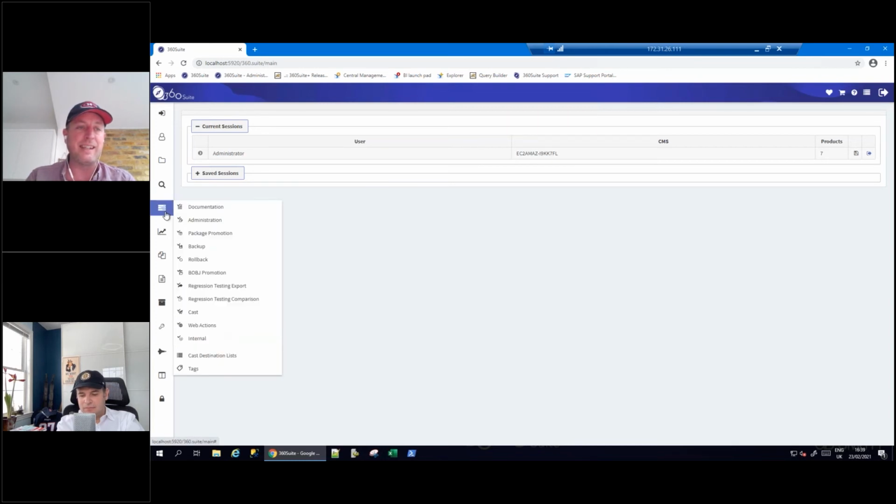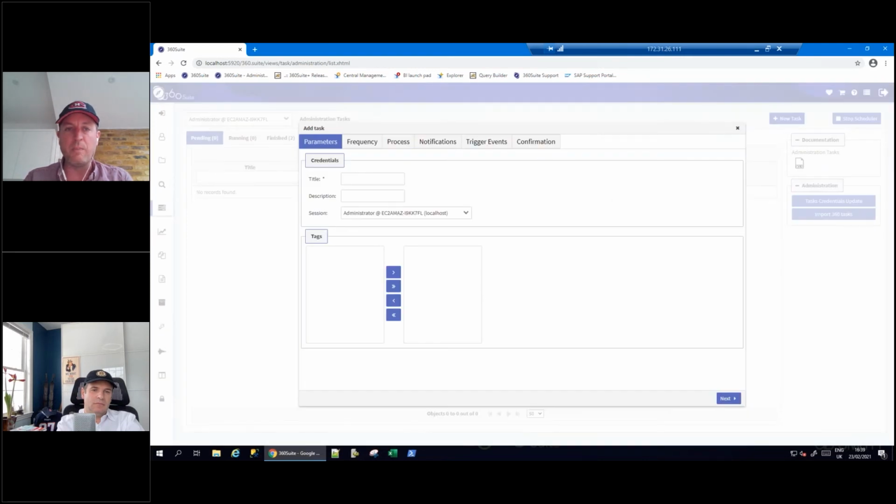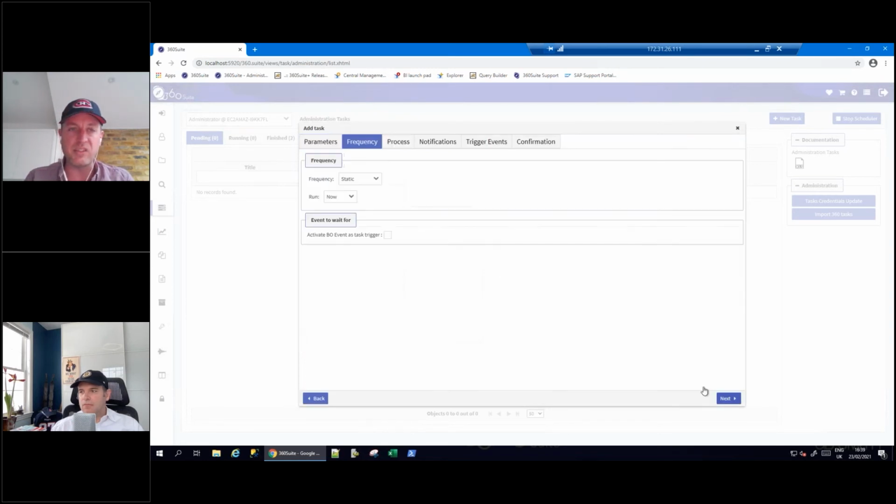But in this case, archiving, and again, this is all about automation. Of course, you could do it manually within this interface, but as part of the project plan, you could say, right, okay, from midnight tonight, this Tableau content is now live, and this business objects content is deleted or archived, and you could schedule the entire process here.